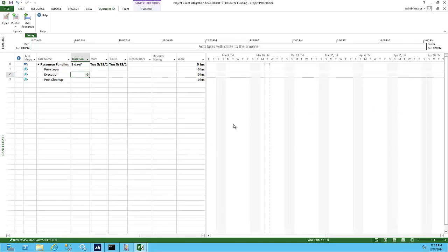This is demonstration 2 on how to associate tasks in Microsoft Project with categories from Microsoft Dynamics AX. In Microsoft Dynamics AX, project activities can optionally be assigned to project categories. Before you transfer a work breakdown structure from Microsoft Project, you can assign the activities in the work breakdown structure to categories that are imported from Microsoft Dynamics AX.